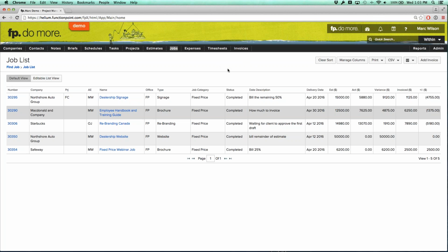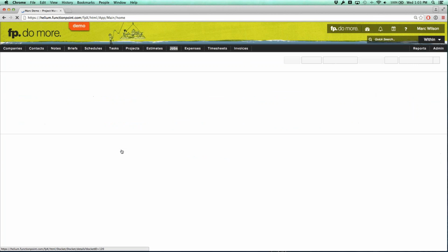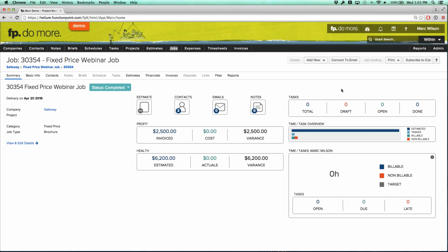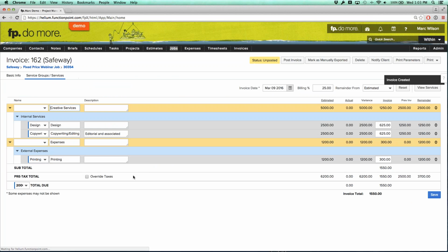So, billing the remainder of a fixed price job, really simple. In this case, this one's telling me, bill 25% of our fixed price webinar job. I would just select it and then choose to add new invoice and invoice it for 25% of estimated, add invoice.